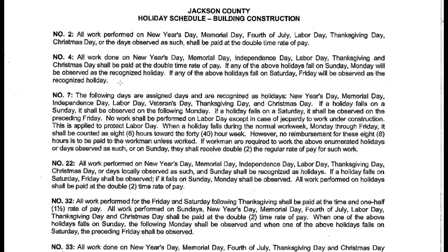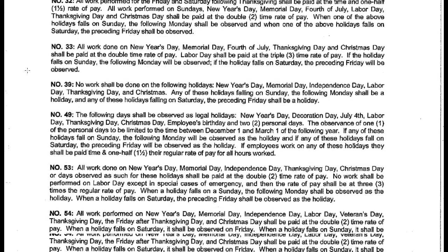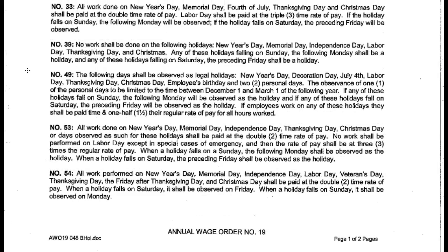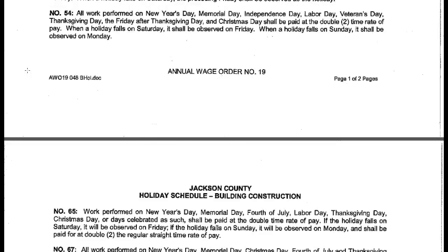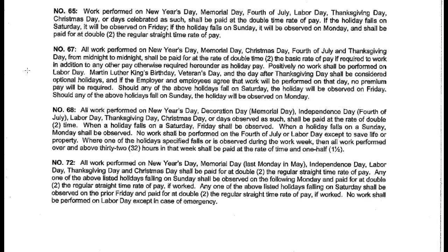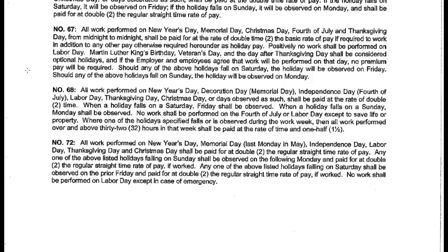And once you know the holiday schedule, then you know when you have holiday pay periods, or when you have different considerations as far as how much you pay people. So you'll go through for each of your folks, and this is one of the reasons you set up your holiday schedule, especially when we get to the Primavera, and we're looking at how to schedule the work. These are the paragraphs that will tell you which of the holidays that you have to work.